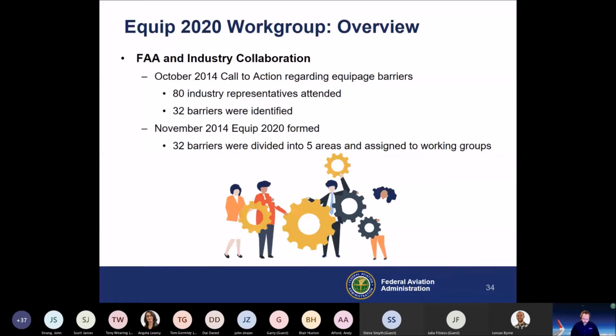So some of the barriers that were identified by our carriers: ambiguity over which GPS receivers to purchase, limited availability of necessary equipment and resources, FAA resources for certification and approval. So getting all these aircraft through the process of being approved was a significant barrier, or perceived to be. General Aviation and the various associations identified equipment and installation cost, the performance, privacy concerns about the information about all these aircraft being aware, everyone being able to have access to all this information.